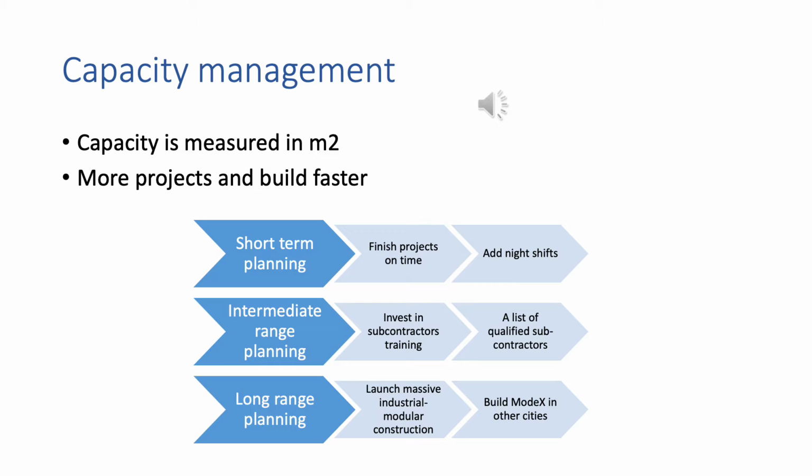In the short-term period, the company is trying to keep up with the finish dates of the current projects. Due to COVID-19, the construction works slowed down and personnel of BI Group was allocated to build hospitals in all cities of Kazakhstan. Therefore, currently the company is applying all of its efforts to finish projects within promised dates. One of the measures is adding night shifts.